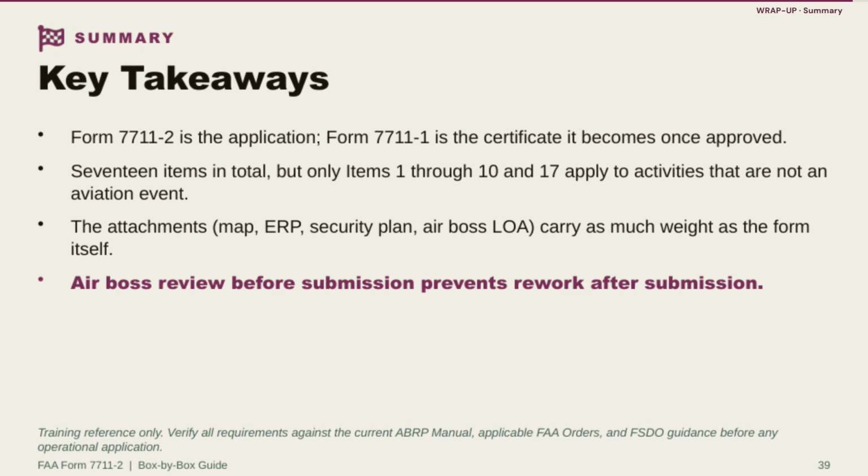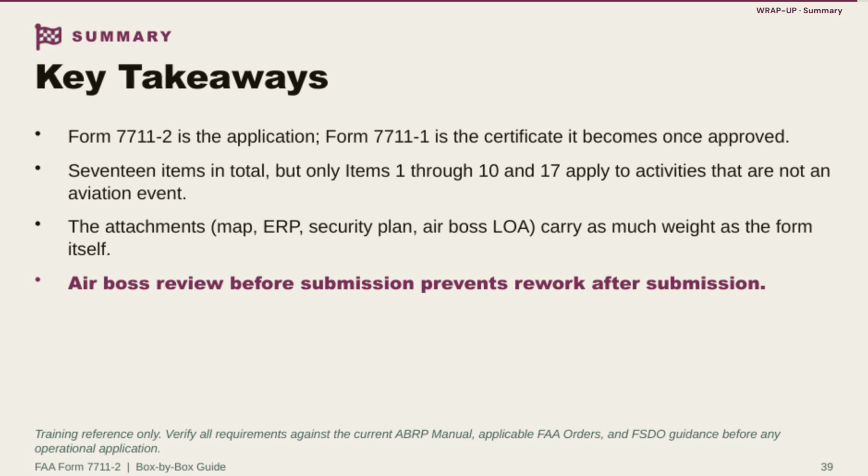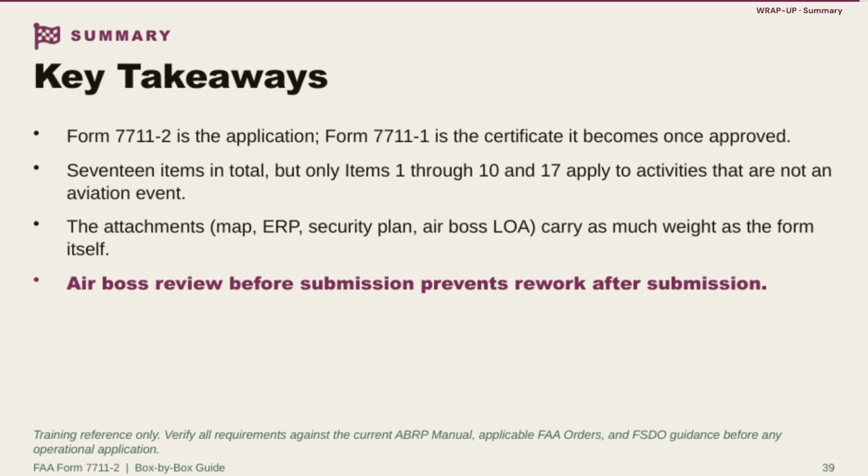The attachments, the map, the ERP, the security plan, and your Airboss LOA carry just as much weight in this package as the form itself. A technically complete form with a weak attachment package is still an incomplete application in practice. And the theme running through this entire guide is timing. Airboss review before submission prevents rework after submission.